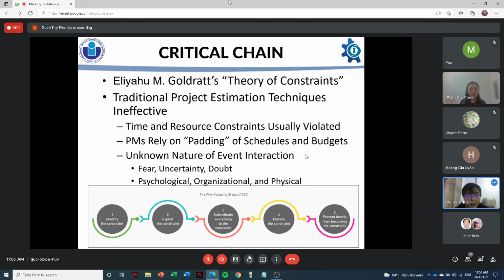So the critical chain project management, or CCPM, is described as a method of planning and managing a project that emphasizes the resources like people, equipment, physical space that are required to execute the project's tasks. It was Eliyahu Goldratt, the brilliant business management expert and renowned writer, who developed the critical chain method in 1997. Goldratt's ideas on critical chain project management are based on one of his earlier creations, the theory of constraints, or TOC in short.